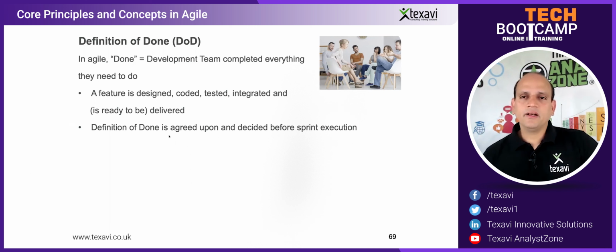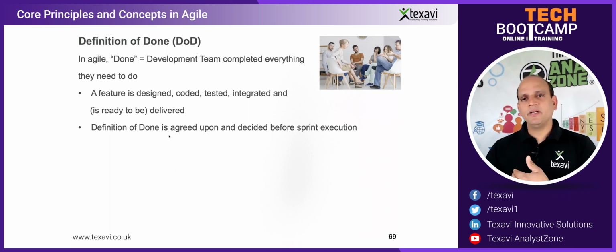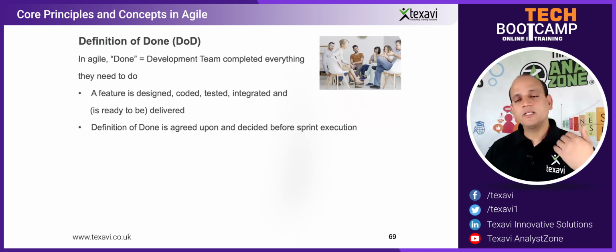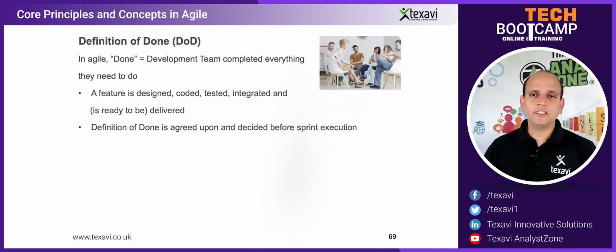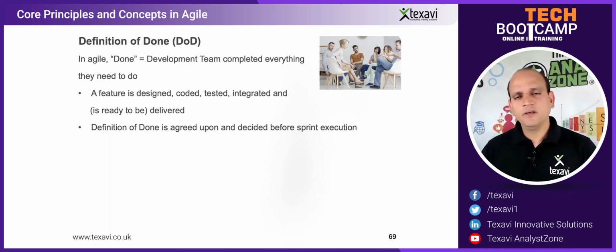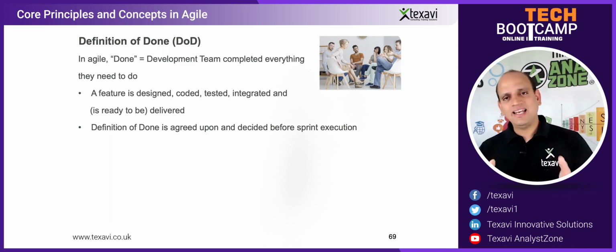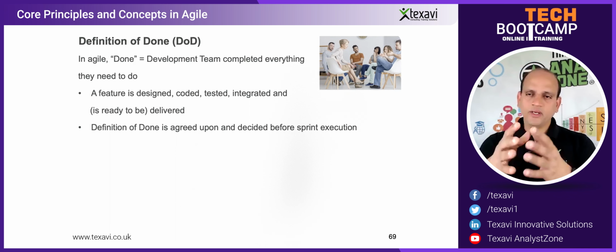But make sure that your definition of done is actually agreed upon even before we start the sprint on Monday. So by today, the end of today, Friday, all of us need to agree on this one and commit to this, right? Because by this time, in fact, we should have estimated how much effort it would take to complete the items list page, what is involved, what is the size of that page, what is the scope of that work, how much effort is involved in designing, in having the database, in pulling the data from the database and showing it on the front end.